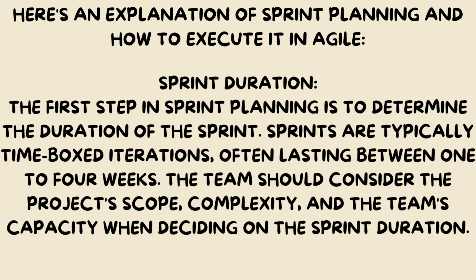Sprint duration. The first step in sprint planning is to determine the duration of the sprint. Sprints are typically time-boxed iterations, often lasting between 1 to 4 weeks. The team should consider the project's scope, complexity, and the team's capacity when deciding on the sprint duration.